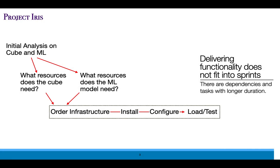One of the first difficulties we'll encounter is that all of our deliverables will not fit into a typical sprint. So we'll need to determine what the dependencies between tasks are, schedule those out, and we'll have to deal with components that will take longer to develop and deliver than a single sprint.